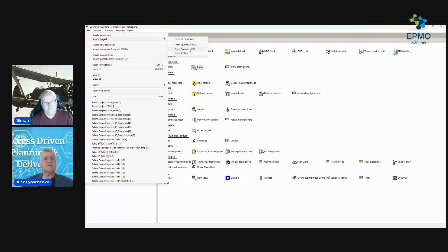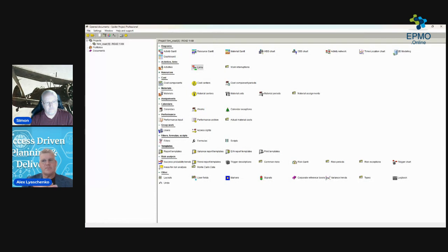For example, the one I've opened is 1 kilometer of road. That's actually the fragment, if you would like, the template. It's actually called a fragment. Let's assume you need to do 3 kilometers of road of this type. It's important to know what is scalable. If it's materials, they will be fully scalable, so 3 kilometers will be 3 times more. But if it's resources, I do not need 3 bulldozers, I still need 1 bulldozer. For workers, you need to specify the scalability of these templates. That's what is done in the system.